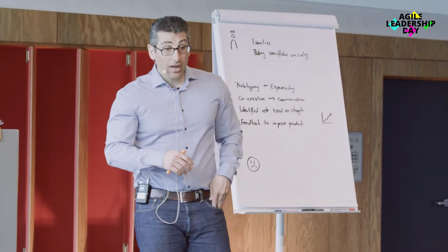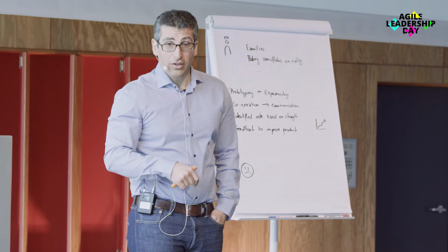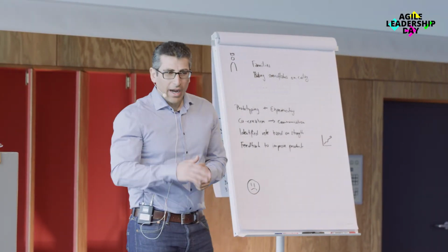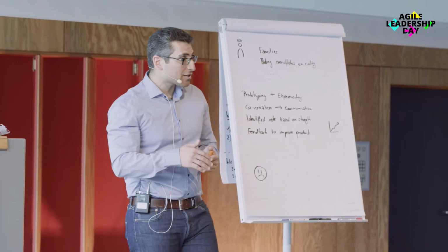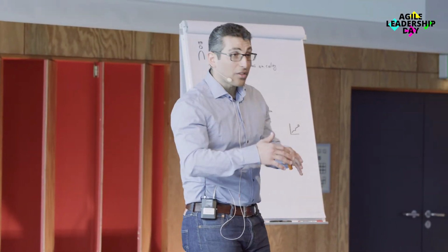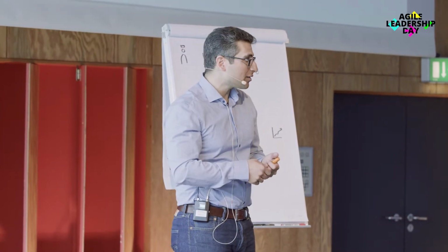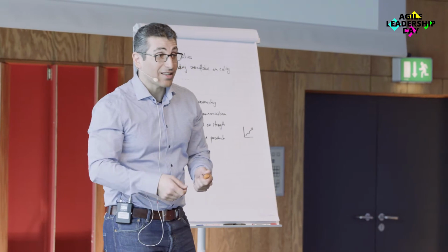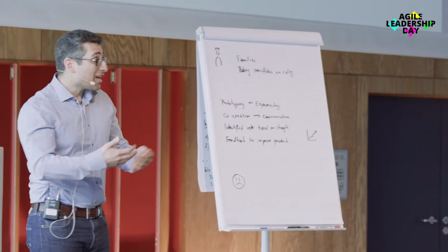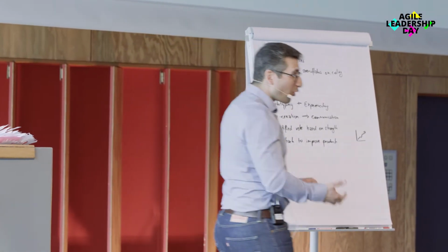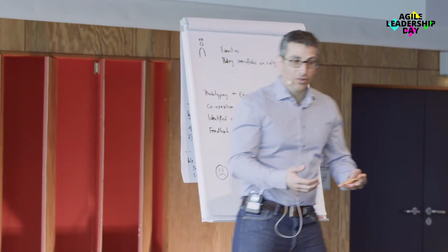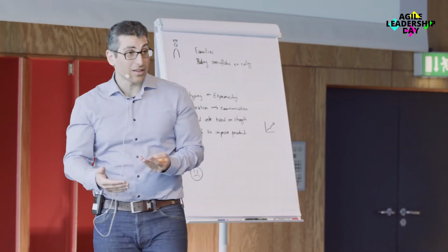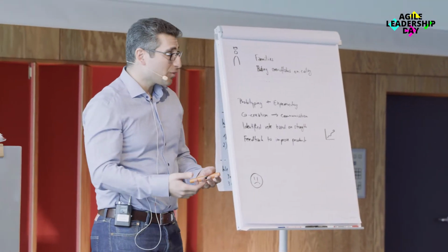Another thing you could have done better is take more time for reflection. Not only reflection on what we build, but also on how we build it. I don't know if you remember at one point during the exercise, I said, hey, take a minute or two and think about how you can improve building the snowflakes. You guys barely listened and just continued working. And that's very normal, right? So that's why we need a certain type of role in Scrum, being the Scrum Master, who says, now we're going to stop and we're going to focus on process improvement as a whole team, right?